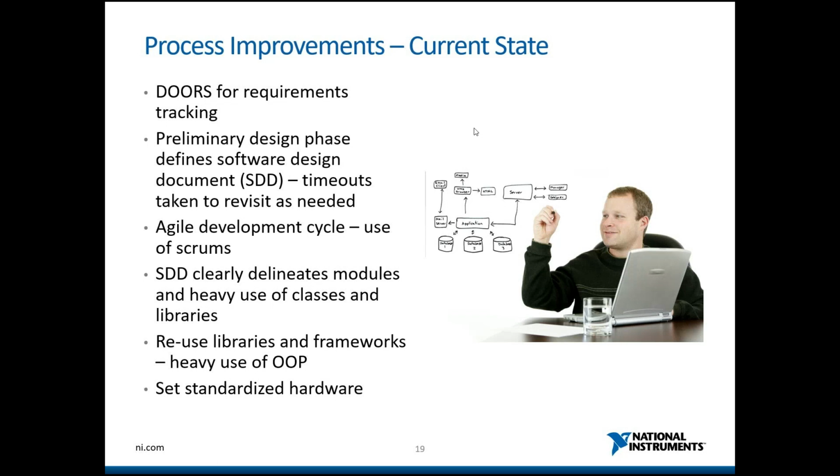All right, how often do you perform a software sprint review? I think that really depends on the size of your project, and also how many projects you're working on at once. If everybody on your team is working on one project, I think every week is great for reviews. If you've got developers working half time on your project and half time on another, meeting every week might not make that much sense, because it depends on how much work they can get done in between.